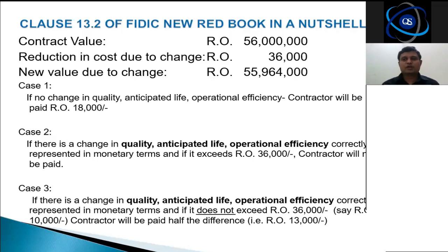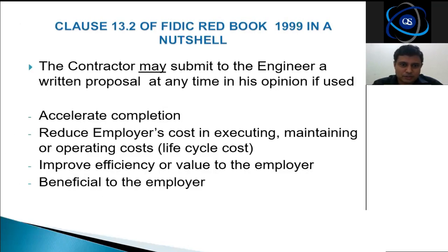Why? Because that clause says so. That clause says if you are having a saving from the initial contract value, that particular saving has to be shared 50-50.